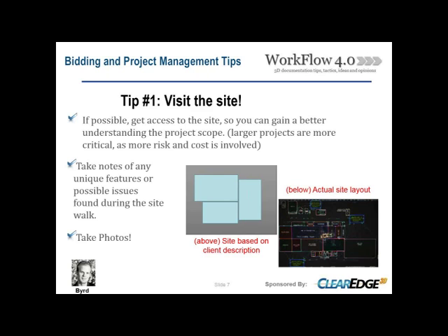Based off a phone conversation on a site, we were told we were probably getting into 3 large rooms, 150,000 square feet of building, and then when we actually get to the site, it ends up being 16 rooms, almost twice the size. So site walks are very important, especially on large projects.